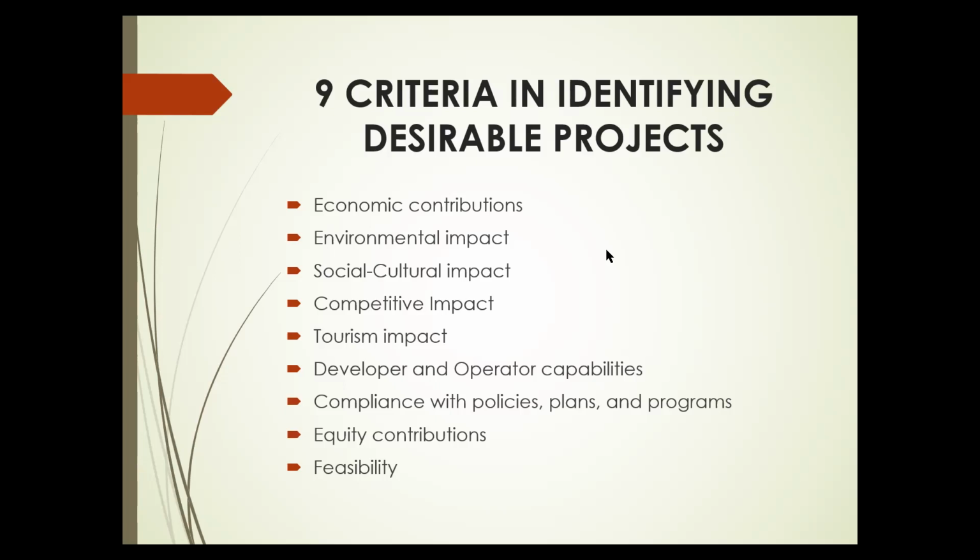Another one is the competitive impact. So the government agency should check if the project complements rather than competes with the existing tourism business without seriously jeopardizing the financial viability of any individual enterprise. Next is the tourism impact. So we need to check if the project adds destinations by creating an attraction and by being beneficial to the tourism industry. So here we need to assess both the positive and negative impacts of the project.